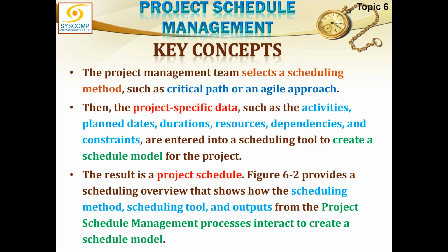So what is this project specific data? This is all the activities, their planned dates, their durations, their resources, their dependencies, all the data about the schedule, which actually has to be encapsulated into the schedule model. So all this data, by the use of the scheduling tool we have selected in accordance with that scheduling method or methodology, which was earlier picked for this project, we create a project schedule model for the project.